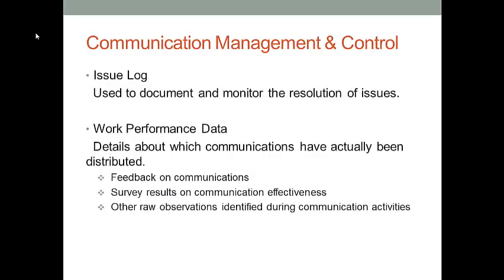The information updates may not always be good news. Sometimes you have to share bad news with the stakeholders. In addition to sending out the bad news, you want to establish something called issue logs. In these documents, you want to record information such as what the bad news is and what your proposed solution is. Also, you want to record the stakeholders' reaction to your proposed solution.